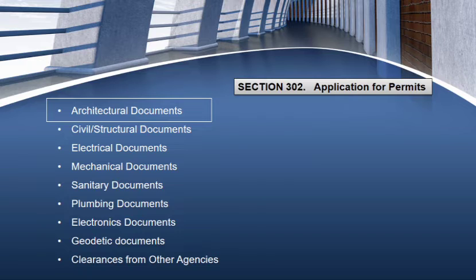D, detailed design of all such accessibility facilities outside and around buildings or structures, including parking areas and their safety requirements, all at a scale of 1:50 or any convenient scale. E, fire safety documents, and F, other related documents.